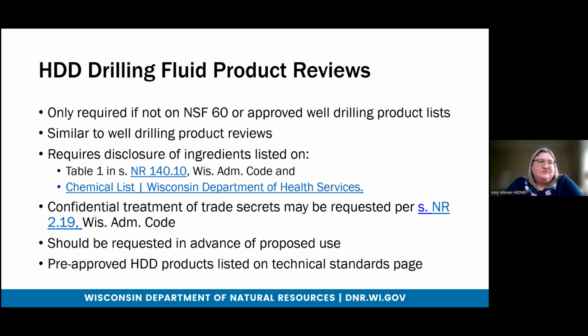Our drilling fluid product reviews for HDD-specific products are similar to our well drilling product reviews and require disclosure of any ingredients that we have water quality criteria for in groundwater, and anything on our health department website for chemicals that have potential human health effects.